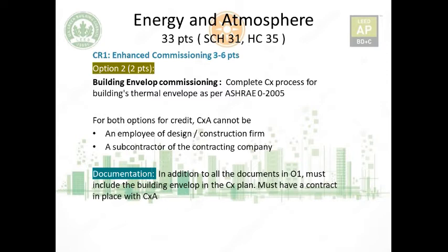Now for the documentation, for all documents which we have seen in option number 1, on top of that, it should include the building envelope in the commissioning plan and should show a contract in place between the commissioning authority and the owner.